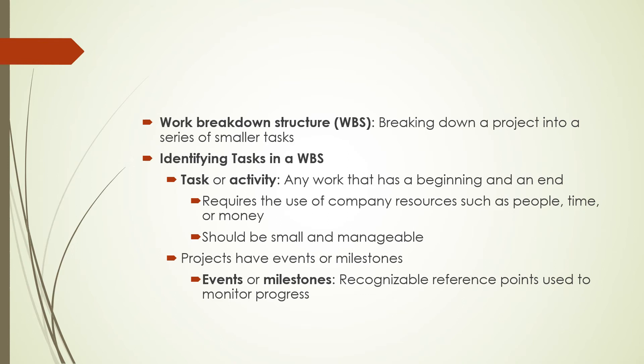Work breakdown schedule or work breakdown structure consists of breaking down a project into a series of smaller tasks. You have to identify the tasks in a work breakdown structure. A task or activity is any work that has a beginning and an end. It also requires the use of company resources such as people, time, or money. Should be small and manageable.